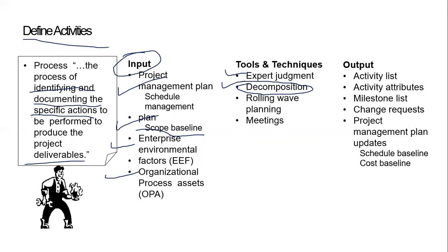Okay, fine, but what are you going to do in the first month? You will define something. Okay, I will construct the first 5 kilometers of road. Okay, within that 1 month, what are you going to do every week? So everything has to be decomposed to the activity level. That way it is more accurate for anybody to track it later as well.